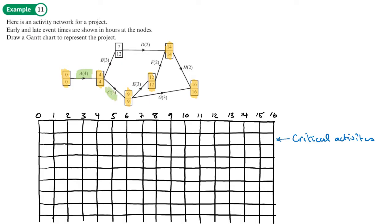C is critical. Four plus five is nine. E is critical. Nine plus three is 12. F is critical. And H is critical. So they're all going to go along the top. Now notice that the times here in the hours, the times go on the lines, not in the boxes.